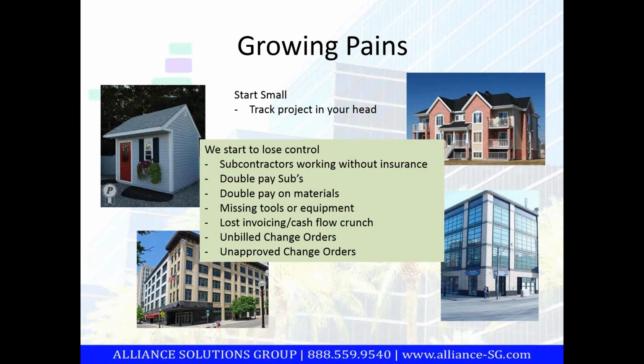I start double paying some subs out there that in their own right have poor bookkeeping, and I'm just trying to keep up with the bills, so I've made some duplicate payments. Some materials that have been dropped on the job site, I've overpaid for those because I haven't matched them up against a purchase order or what I actually suggested it would be in estimating. There are tools that I've lent out at the job site or equipment I'm using at the job site. I can't remember where that backhoe was and who was actually using it.